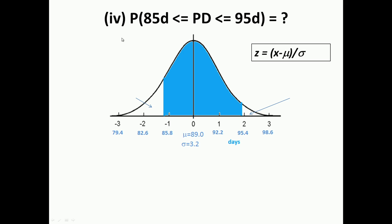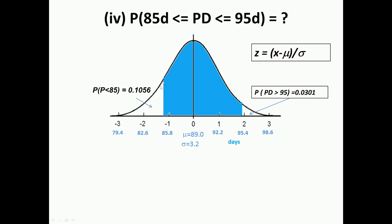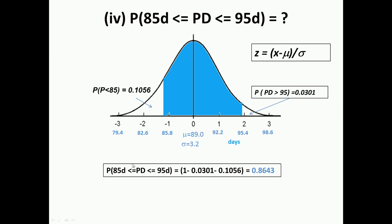The third probability question was: what is the probability that the project duration lies between 85 and 95 days? The shaded area represents P(85 ≤ duration ≤ 95). We can calculate it from our earlier values: the area beyond 95 was 0.0301, and the area below 85 was 0.1056. Since the total area under the curve is 1, subtracting both tails gives 1 − 0.0301 − 0.1056 = 0.8643. So the probability of the project duration lying between 85 and 95 days is 0.8643.